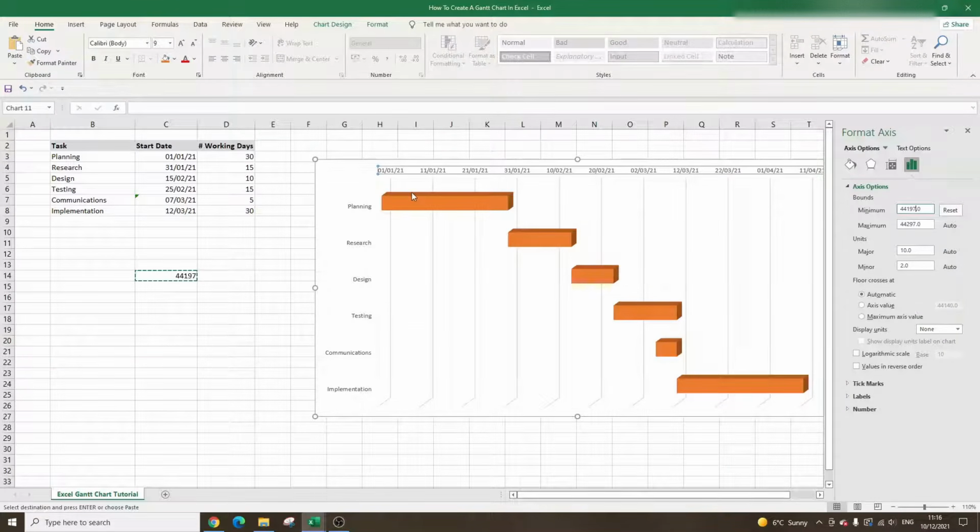It starts from the start of the year and goes throughout. And as I said with my dates earlier, these are in succession, so you'll see it's a hard kind of stop and start, but you may get, in your own Gantt chart, tasks overlapping. It really depends on your task. So add the tasks that you need for your Gantt chart, and just add the dates, and you will see the Gantt chart reflects that if you set it up properly.